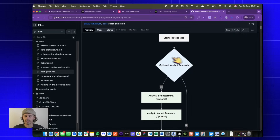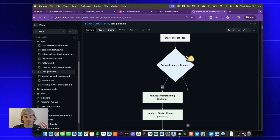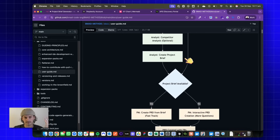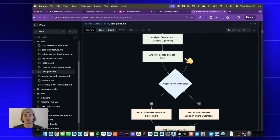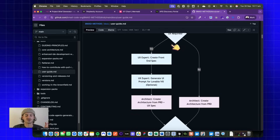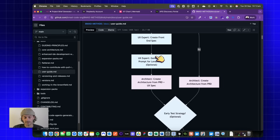In the planning workflow we use the analyst to do things like brainstorming, market research, competitor analysis, and creating project briefs. The project brief is like the core document that the rest of your project is built on — it has things like overview, business use case, target users, and all that kind of stuff. From there, the project manager creates the Product Requirements Doc or PRD, which is a slightly more technical version of the project brief. Then the UX expert builds front-end specs.